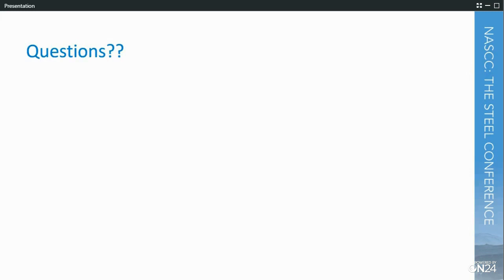At the approval process, we typically go through and review the material needs too, to make sure that we have everything covered and nested. If we don't, then we'll bring it in. So the idea is that we have all of our material when it's released to the shop, but through the different reports and processes, you can see which specific piece mark the material's not here for yet, and we start to dig through it.